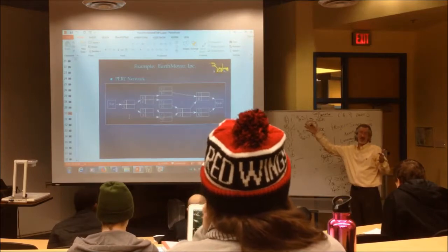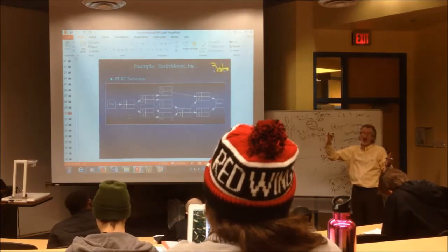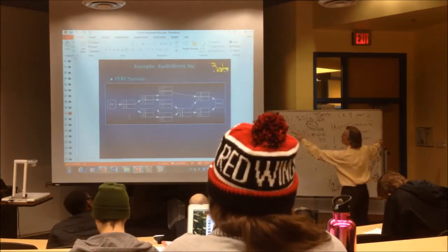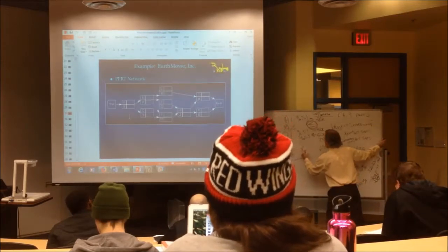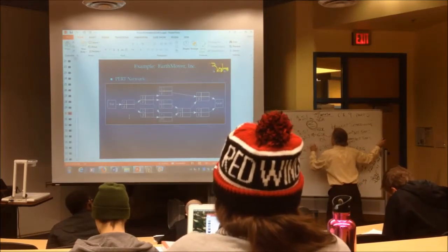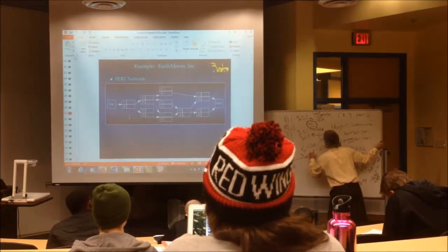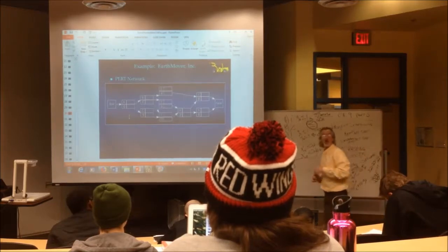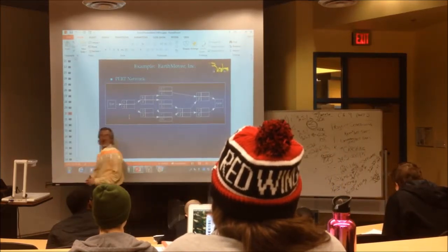So this project's supposed to take 30 weeks, but our management said, let's crash it to 26 weeks. Is that correct? So we got to make which activities here? X sub I less than or equal to 26, and X sub H less than or equal to 26. Those are the additional constraints that are really telling the program, here's what you really want to crash to.